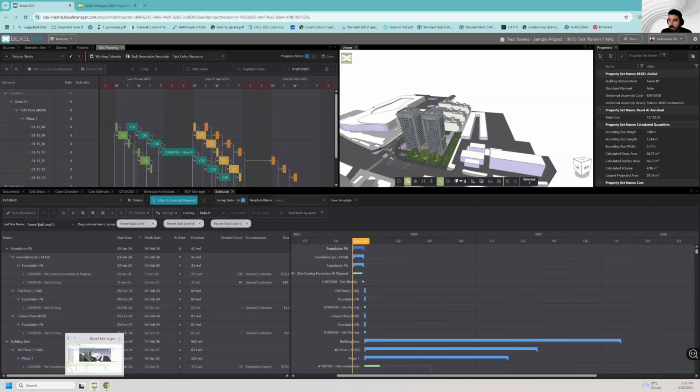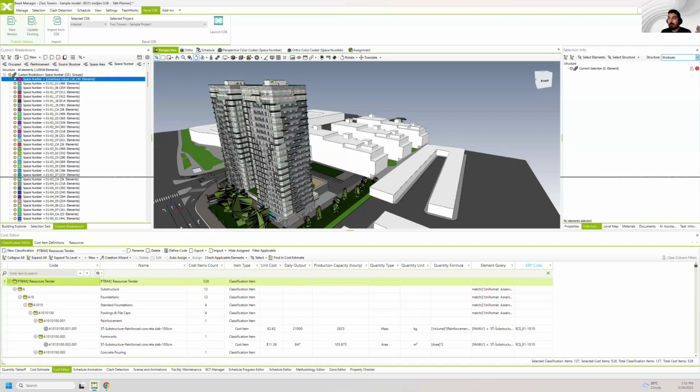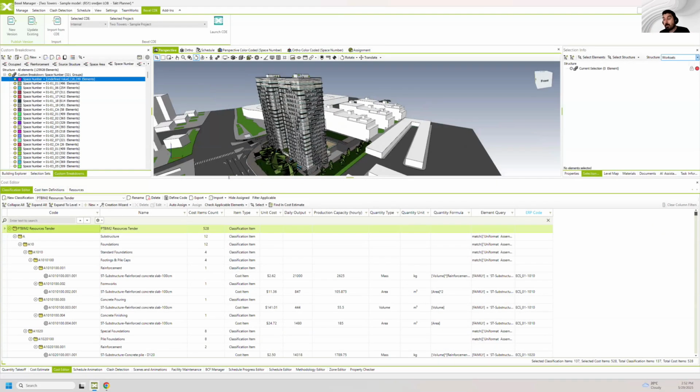So the whole idea, the focus, and the main purpose of this integrated BIM is to have reliable information. Everything that you see is possible just because we have reliable information in the model. Why? Because the only sure thing on the project is that the project is going to change. So when somebody tells you that he calculated the quantities to the lowest detail level possible, that's fine. If you did it manually, how valid is that going to be in 3 months? Probably not much, because you're going to get the updates.